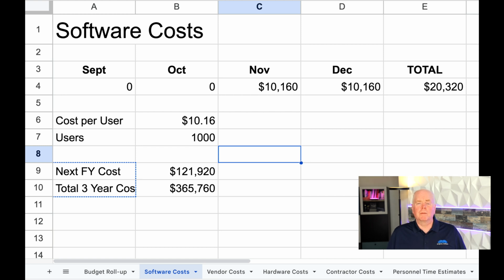So for the way I would budget, if it's a 4-month project, I'm making an assumption there from September through December, and we're assuming a fiscal year in the scenario of January 1. So it's the same as the calendar fiscal year. That's often the case, but not always. Just you need to be aware of it. So for the last 4 months, what is the cost of that software? Well, we're not actually going to buy that software or sign that contract until we're a little bit farther along in the project, because it would just be sitting there and we'd be wasting that monthly fee because people aren't using it. We're actually going to sign it a month before the go live so that we have time to then get the software ready to go for everybody, but not before then.